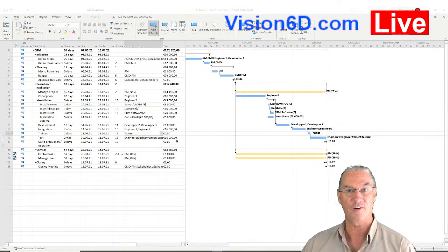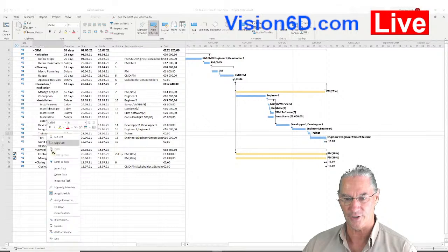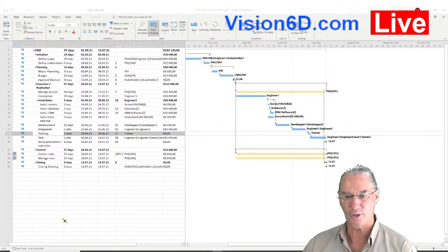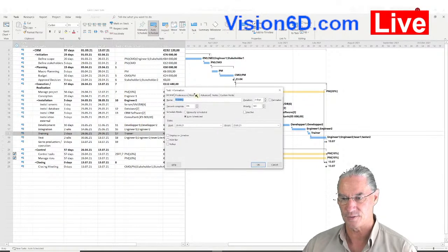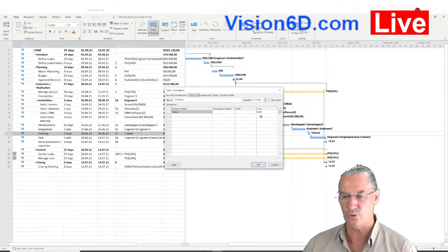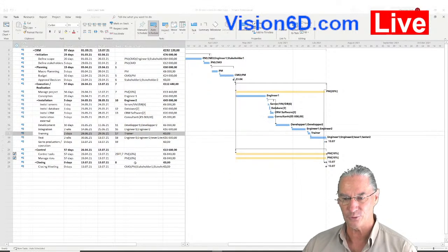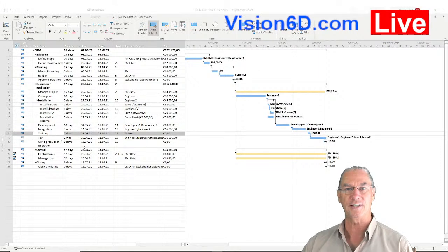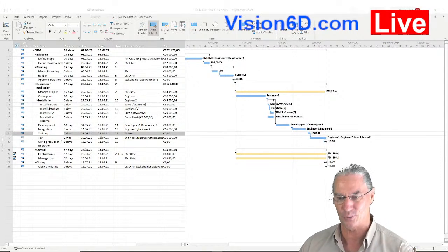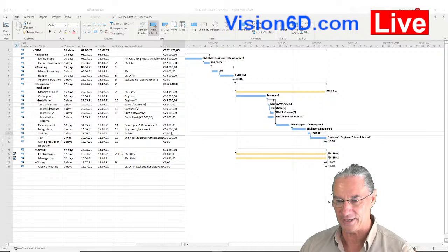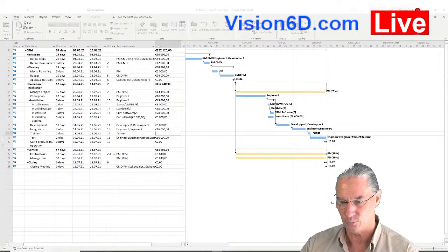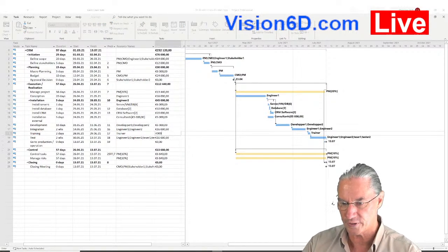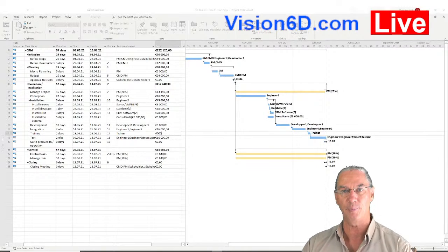So the trainer is defined, there are no costs. Normally, I would tell you to go into here the information, as we did it with the consultants. You go to resource and you key in here a cost. I'm going to do it in a different, simpler way, and it's how I started to work with cost with MS Project. It's that directly here in the cell, you can key in your 4,000. It's a possibility. It's really simple.